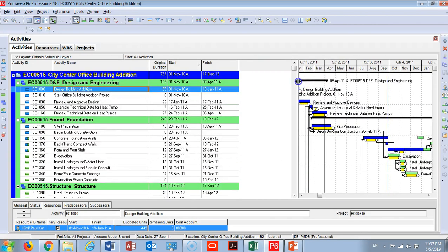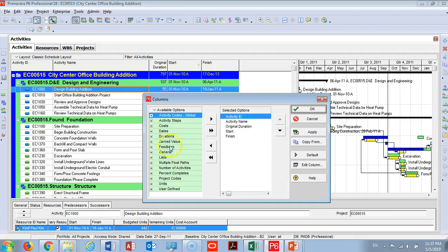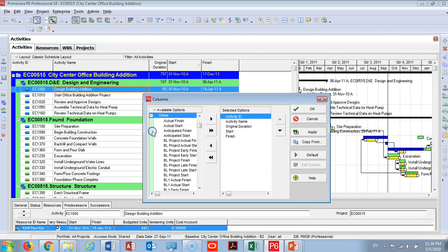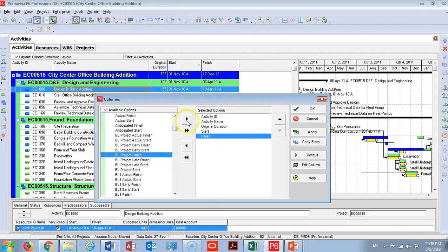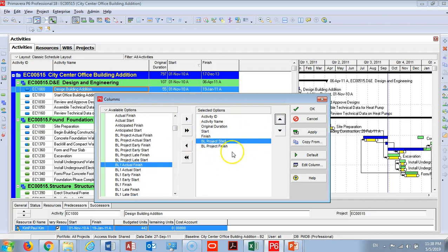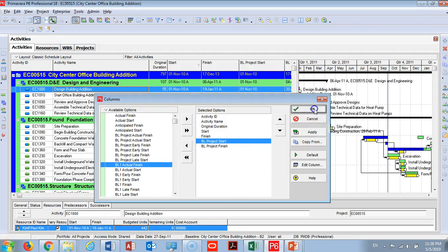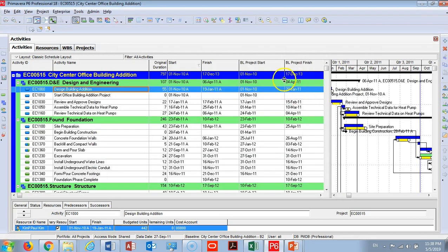To be helpful for you guys, I'm going to go to Columns and I would like to choose the baseline project finish. Also I will use baseline project start. I will move this like that and apply so that you will have your baseline dates and your actual dates ready to do your updates.